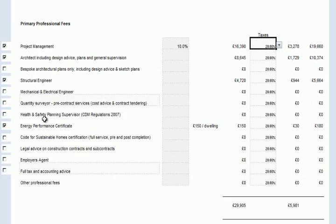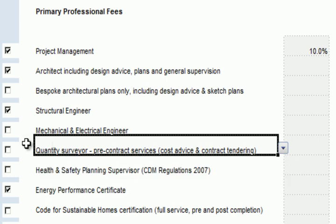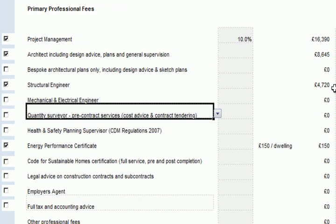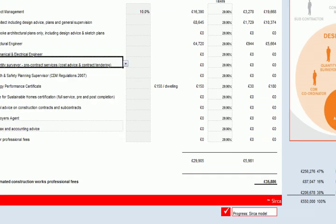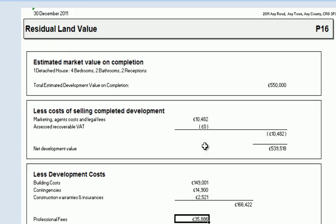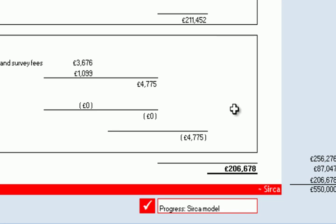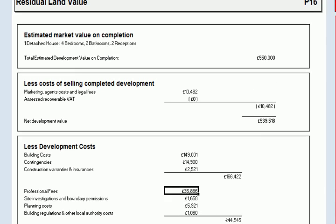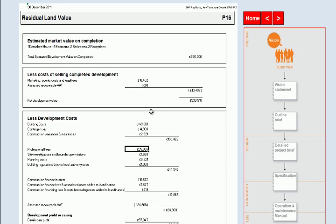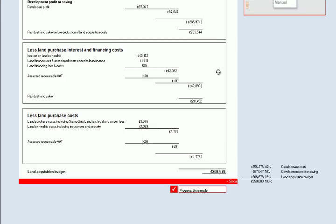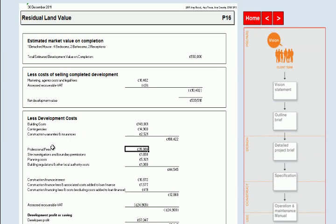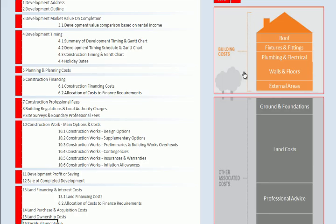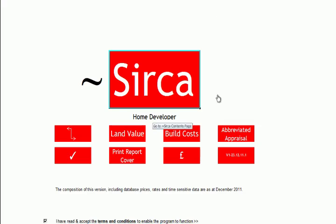Once we've looked at all these individual items and made decisions about whether to employ different professionals and what the likely costs are — or whether the model's defaults are acceptable — we go back to our land acquisition budget and can see the values there have been updated accordingly. That is, in a very brief overview, how you would conduct a residual land valuation to assess whether a project is feasible. We'll look at some of these areas in more detail in other videos, but for now that concludes a very quick introductory section on land values.